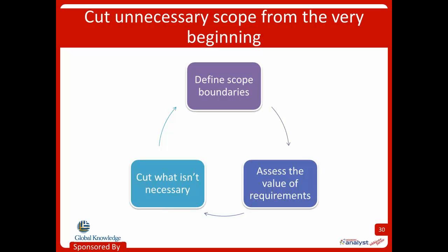So what I'm saying is we can actually look at maybe a set of requirements like a feature, and I can decide, wow, that thing only adds $10,000 of benefit, and I'm trying to get to a $1 million business objective. Wow, it hardly even helps. And oh, by the way, it cost me $8,000 to build the thing. I can use those kind of pieces of information to just start cutting scope. So the idea is if I can quantify that value, I can start to do this throughout the project duration.